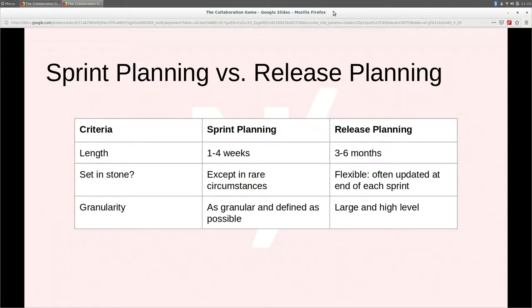So how does release planning differ from sprint planning? Sprint planning: one to four weeks, often two. Release planning: three to six months, often three. Sprint plans we're typically trying to set in stone — it's a contract between the dev team and stakeholders about what we're going to achieve in a two-week period. We occasionally have something come up very urgently that has to be undertaken, but we resist changing that sprint plan as much as we can.